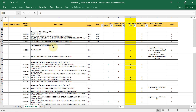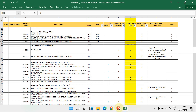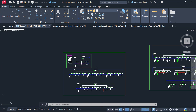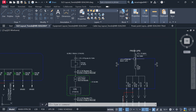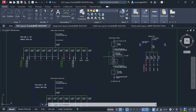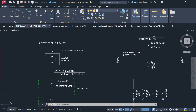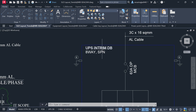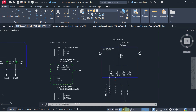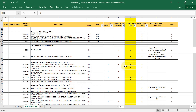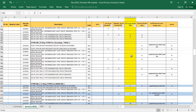For the UPS inverter DB — yes, we are using it, so the total detail is needed. For the 8-way SPN inverter DB, I have filled the details: one 8-way SPN DB, and the 63-amp double pole MCB has a quantity of 4, which I have written.